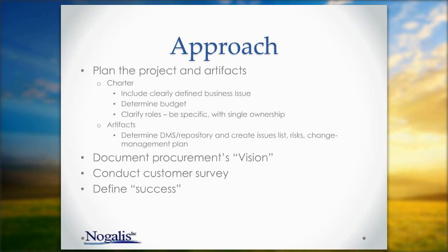Decide where to place the project artifacts, such as a document management system or other place. One recommendation is to not use email to track project decisions and artifacts. List roles and responsibilities. It's easiest to do this in the planning phase, and it will help when a project decision must be made. Have a single contact for each department, one from AP, procurement, and finance, who can coordinate to make decisions on that department's behalf.